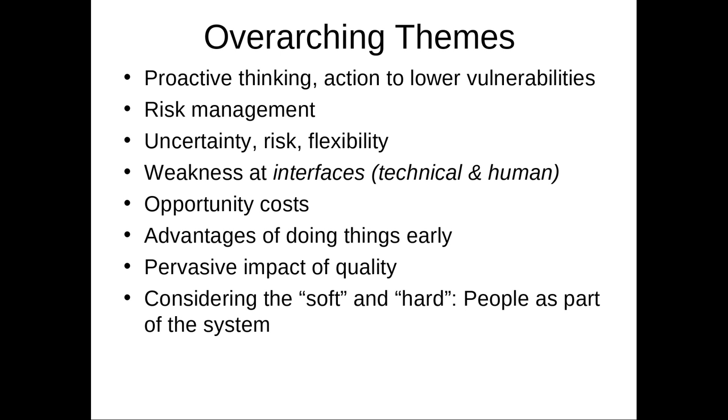Where does this come up in software? Lots of places. It comes up all the time when you have limited resources. For example, testing. You test one thing, and often because you have limited time, you can't test another thing. You put your effort into one feature and it may rule out other features. You have to be judicious and prioritize what you're going to roll out and what tests you're going to undertake in an intelligent fashion, or else you'll potentially be shortchanging yourself. You'll be adding benefit, but foregoing things such that you've actually lost ground.